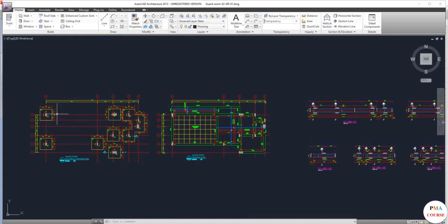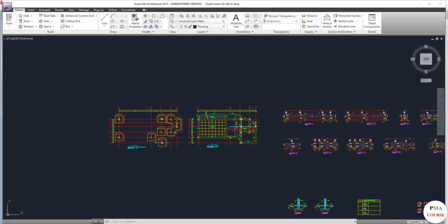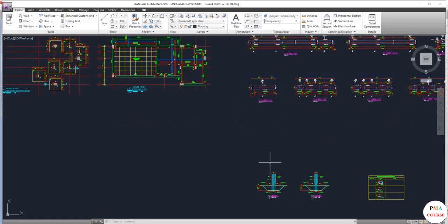Most probably after doing the footings there would be a slab on grade, but before the slab on grade there would be waterproofing and backfilling. So whenever you're working on the schedule, you should imagine how the site will work.